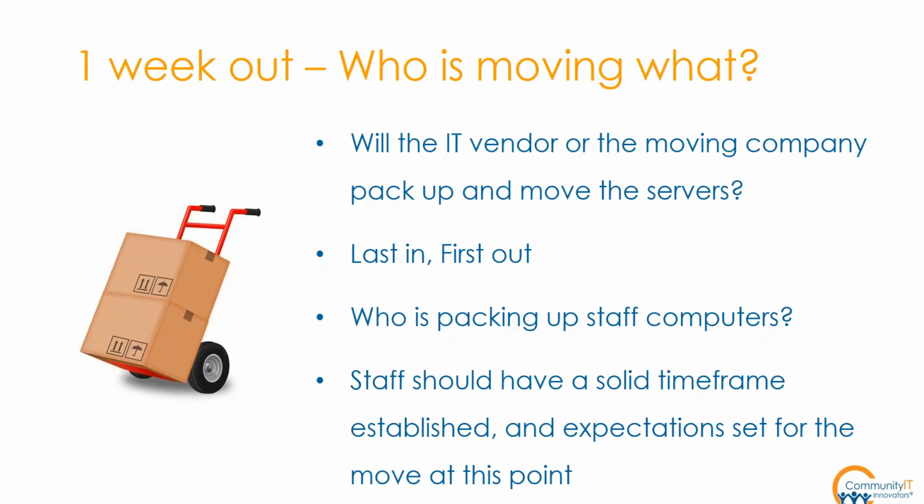Yep, so they'll have all their peripherals and their computer and monitor just packed up with labels on them that say office number 3 or Mike's office. And the movers will pick all that up, bring it to office number 3 or Mike's office, and then you, the IT company, just come in and set it all back up. Yep.